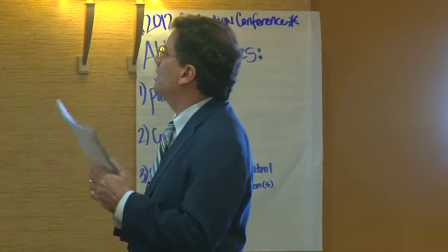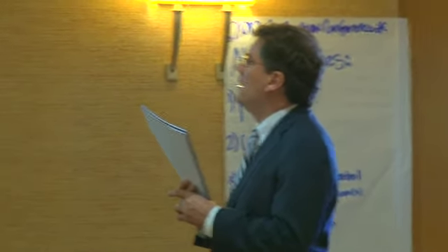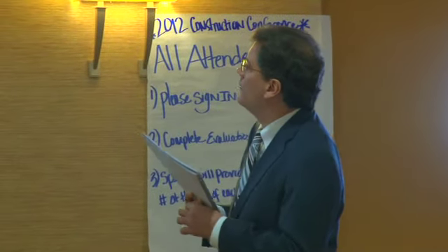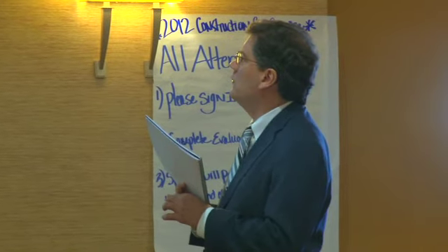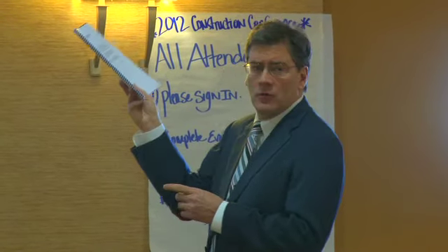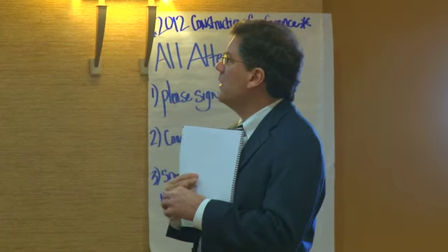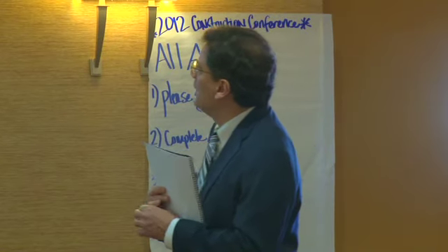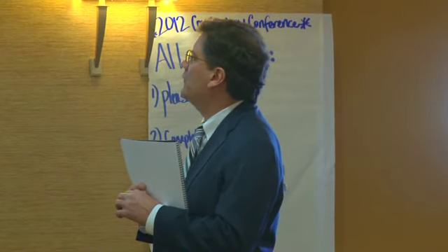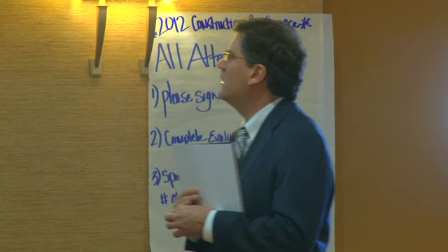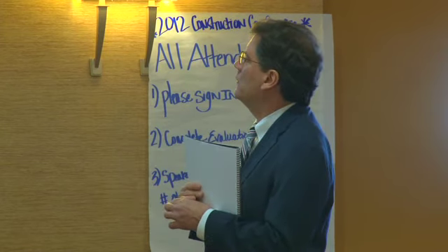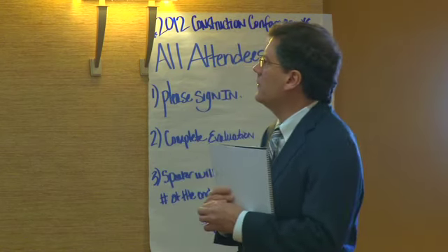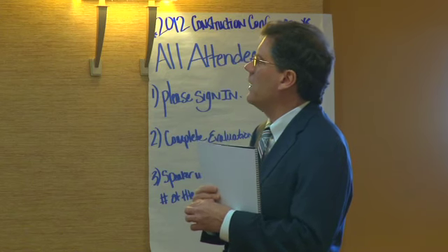It's an unconditional waiver and release of lien, bond, or stop notice rights on progress payment. The undersigned's been paid and received a progress payment in the sum of blank dollars for all labor, services, equipment, or material furnished to the job site or to blank, which is your customer, the person with whom you contracted on the job of, my Safeway at 32nd Street in Camelback, all right? And does hereby release any mechanics lien, any state or federal statutory bond right, any private bond right, any claim for payment, any rights under any similar ordinance, rule, or statute related to claim or payment rights for persons in the undersigned position that the undersigned has in the above referenced project to the following extent.